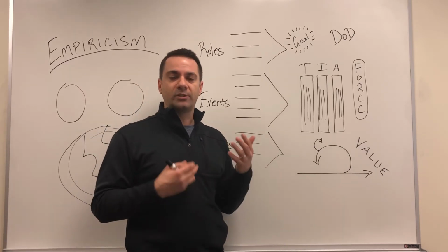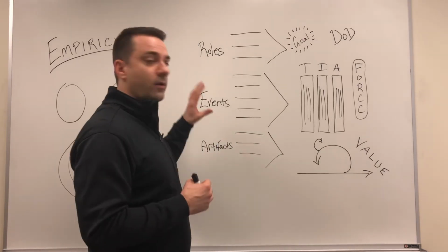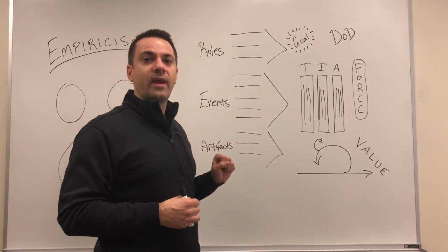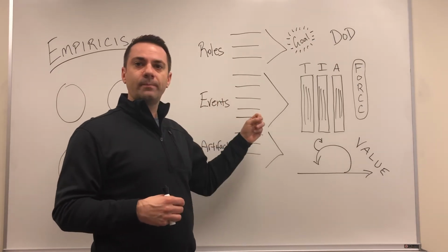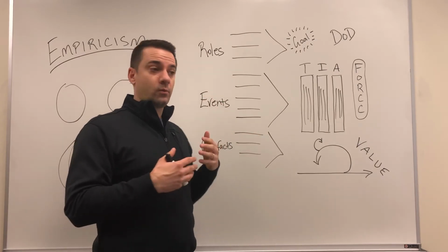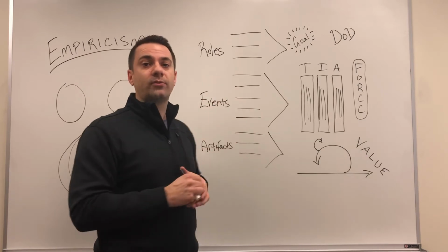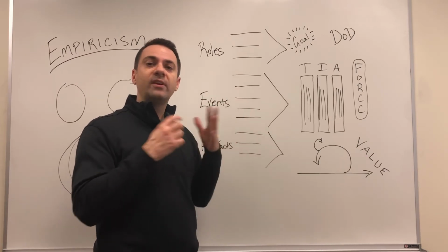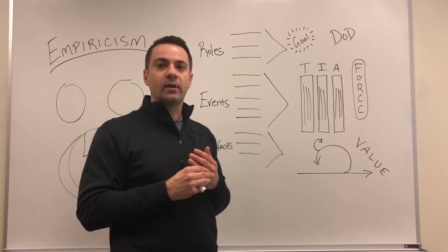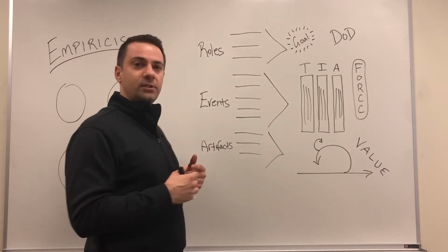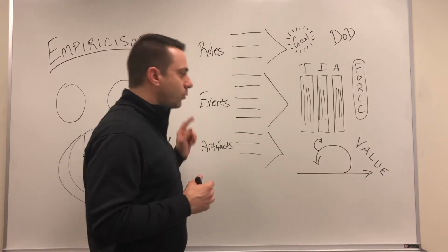And what did we try? We tried an empirical experiment where we talked specifically about the product backlog items on that visual board. Every day, we talked about each item, how we were working, what kind of plan we had, if there were impediments, and certainly how were we able to work toward our sprint goal. Everything became transparent, whereas prior to that, it was not transparent. That inspection and adaptation allowed us to really focus on the work, and that work went on through.